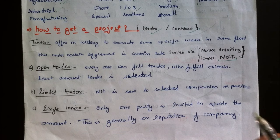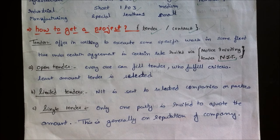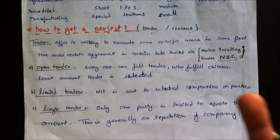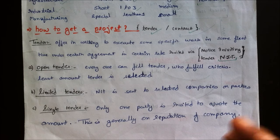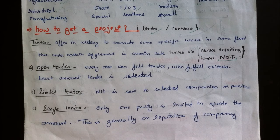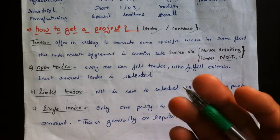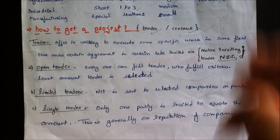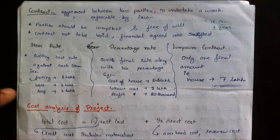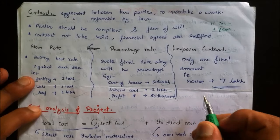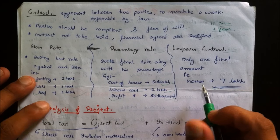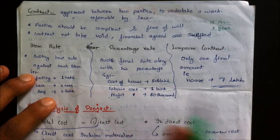A single tender means only one party is invited to submit a notice and that company fills in its amount and sends it back. This is generally dependent on the reputation of the company. For example, L&T is the sole company building metros, so the Government of India gives L&T single tenders and it fills them up.